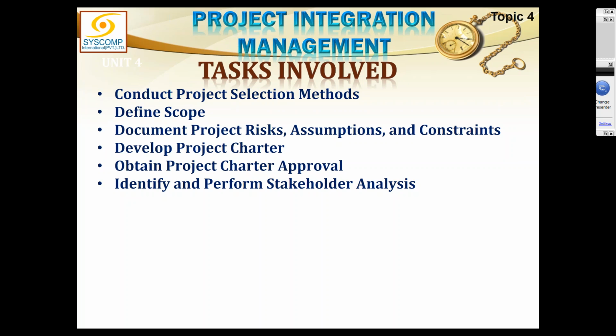So senior management approves the project charter, and if they delegate this authority to the project sponsor, then the sponsor will sign it. And the next job done in initiation is to identify stakeholders and perform the stakeholder analysis. Although this falls under the stakeholder knowledge area, the overall responsibility of identifying and performing the stakeholder analysis lies with integration.